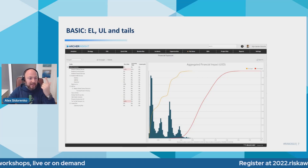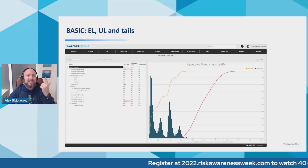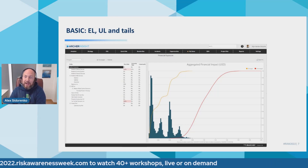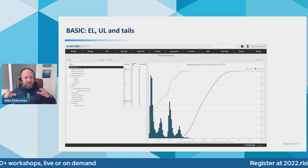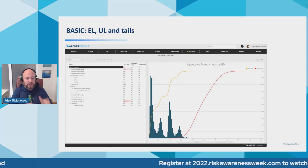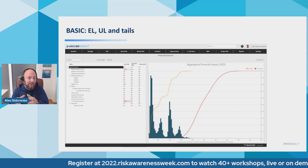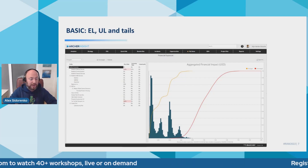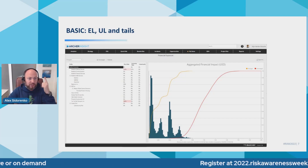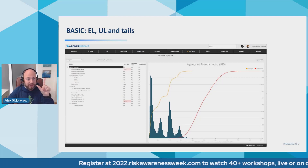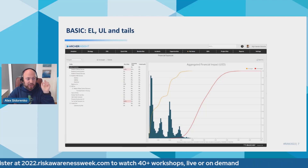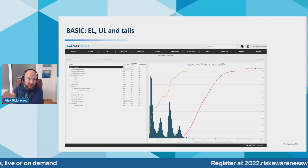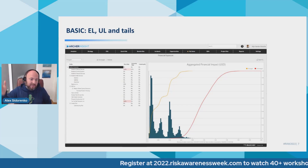Expected losses is super important because you need to budget for it, and second, it gives you an indication of how much money is reasonable to spend on mitigations. I'm doing a session with Brian Putt later this week where we deep dive into one sample risk and show how we assess different effects of mitigations on the loss exceedance curve and how it changes the expected losses. So two important uses: it tells you the amount you need to budget and gives you an indication of how much is too much for mitigation.